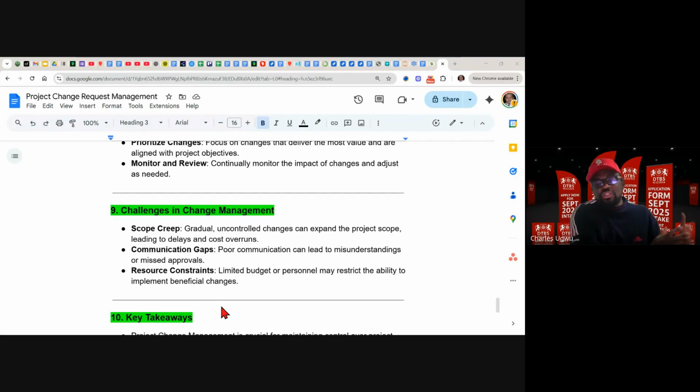You push it to the change control board. Let him go and talk to the change control board. You are not the only one. Don't try to become the change control board, because you are going to mess yourself up. You are going to become the decision maker, and everybody will want you to approve that. So push it to the right people, so that quietly you have transferred that headache to another group of stakeholders. So you shielded yourself from that.